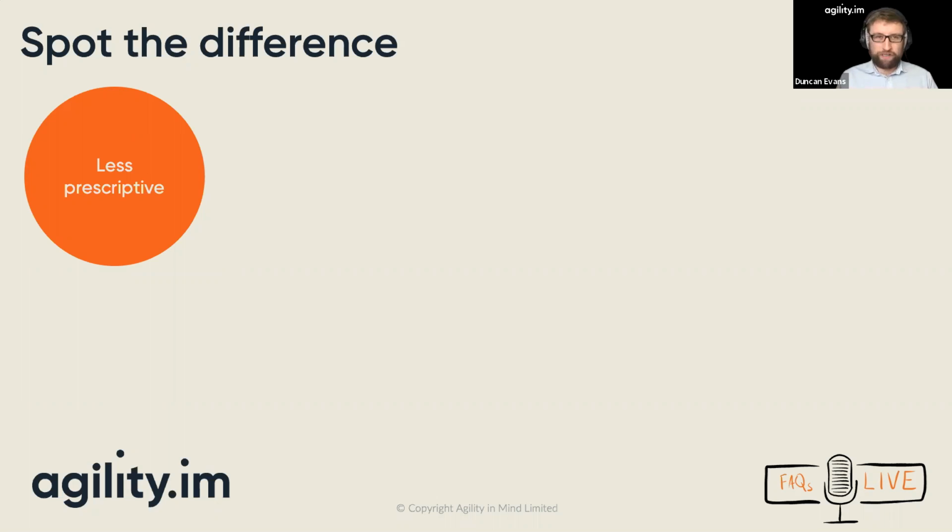Yeah, it was always a bit of a loaded term, I felt, servant leadership. So we've relaxed that a little bit, opened it up to allow you to find your own leadership style. One of the things I quite like is the removal of specific advice, such as the three daily Scrum questions: yesterday I did this, today I plan to do this, I have no impediments. All traces of that have been removed. Similarly, the fact that you have to have a retrospective item in the sprint backlog for next time. Those mechanical things that sometimes get into mechanical Scrum have been taken out, allowing more freedom to do Scrum the way you might want to do it.